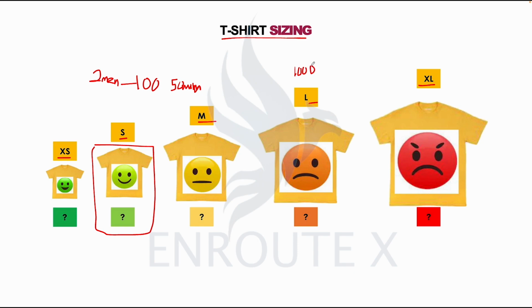So all things being equal, what had changed is the total number of bags. The number of men had remained constant. So we would know that it will take them ten times the time to deliver this. We could also have the number of men changed. So let's assume we have 4 men instead of 2.